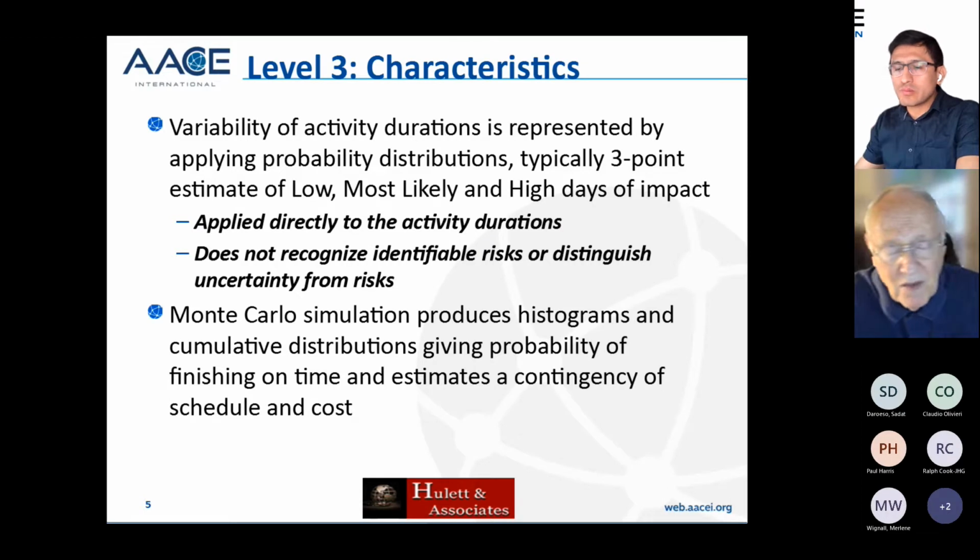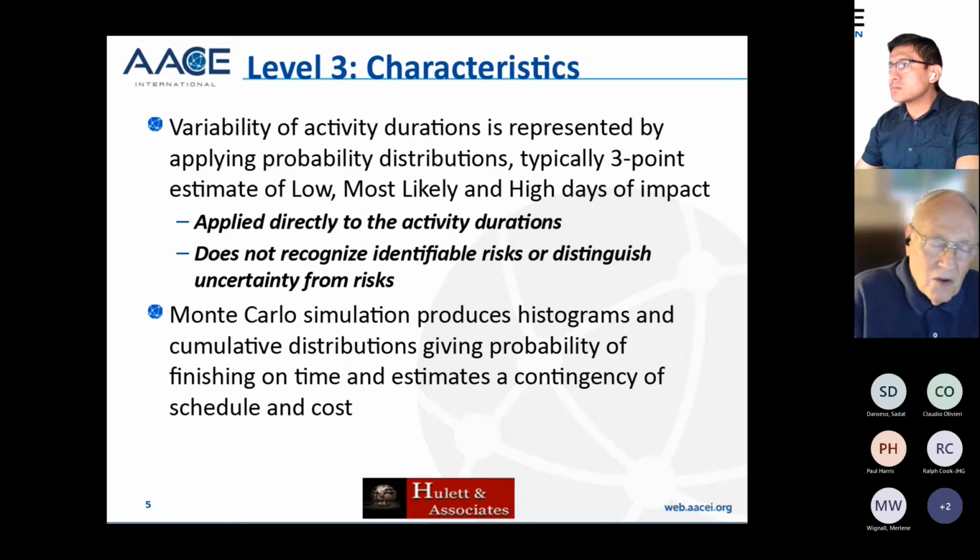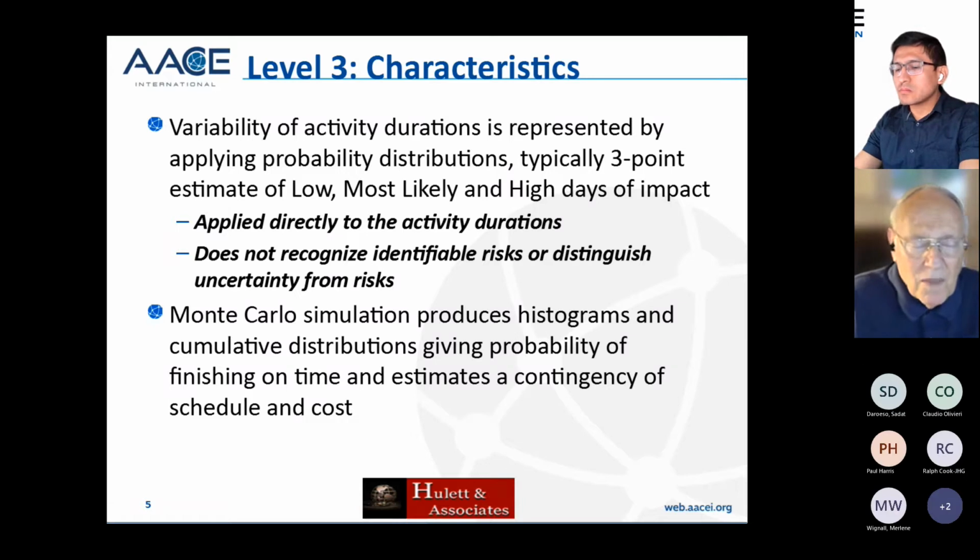So you get somebody, you say you got 50 activities, let's take the top 30 of them. What's your expectation of the range of how long and how short they will be? And ultimately they'll say, okay, give me a 20% and a minus 10%, or here is what I think about how long those activities would be.